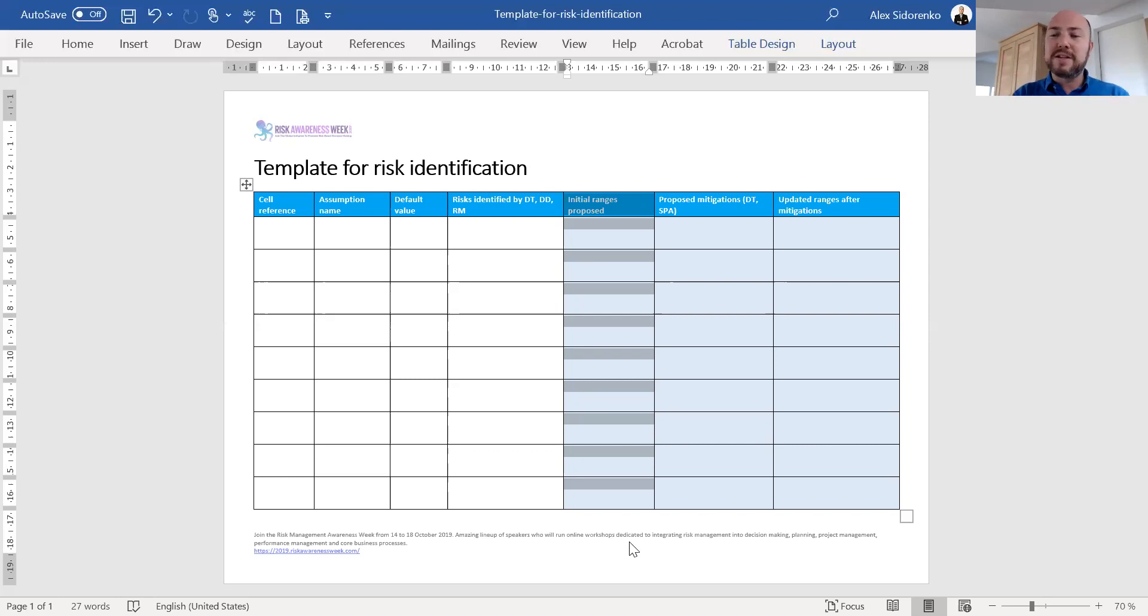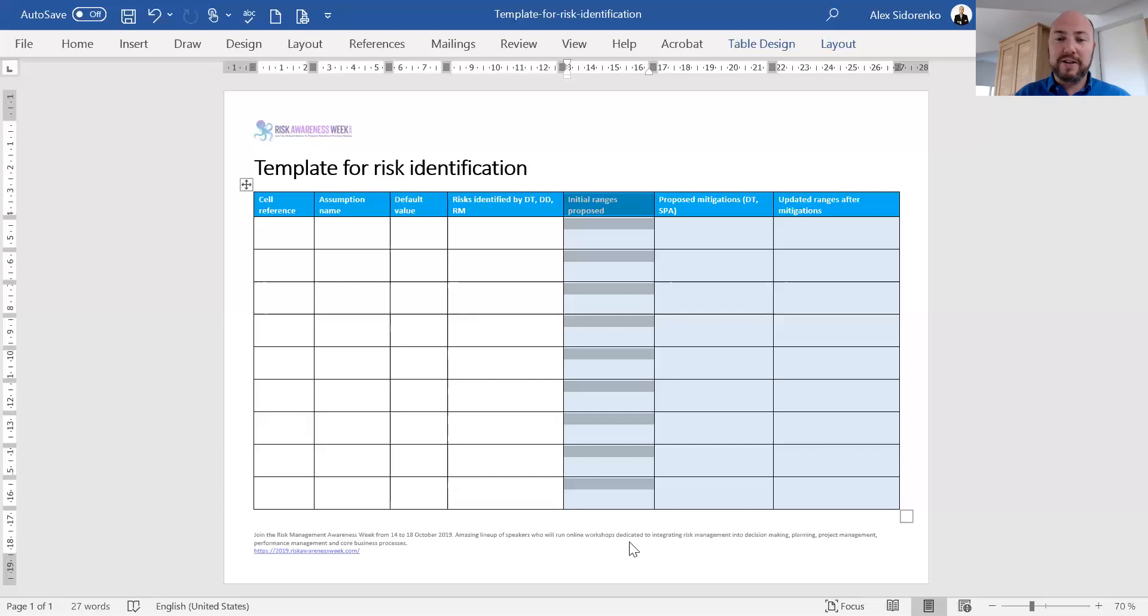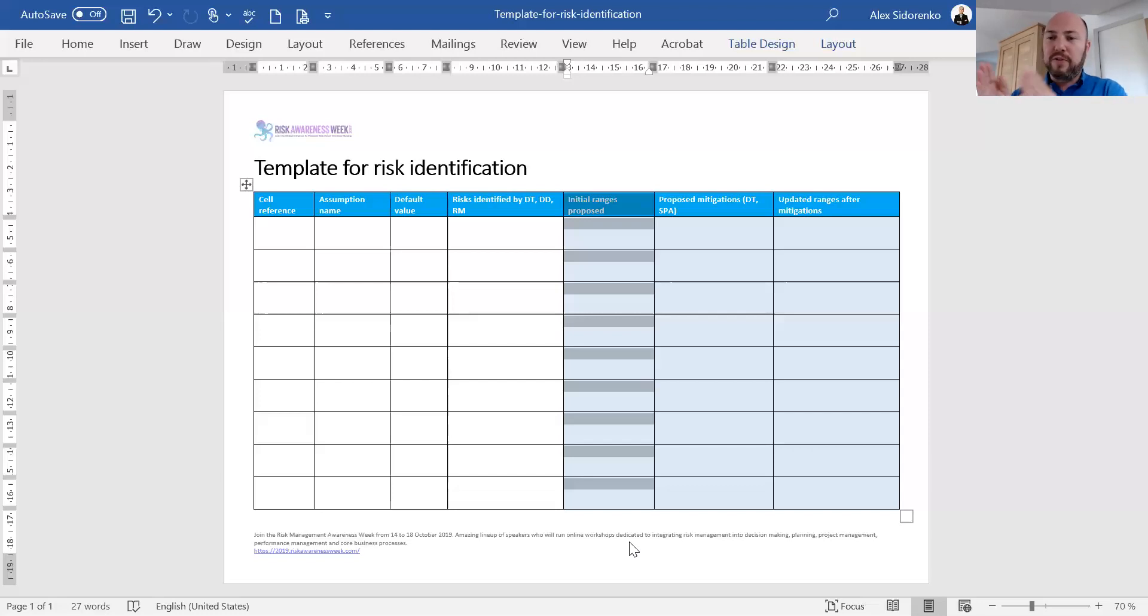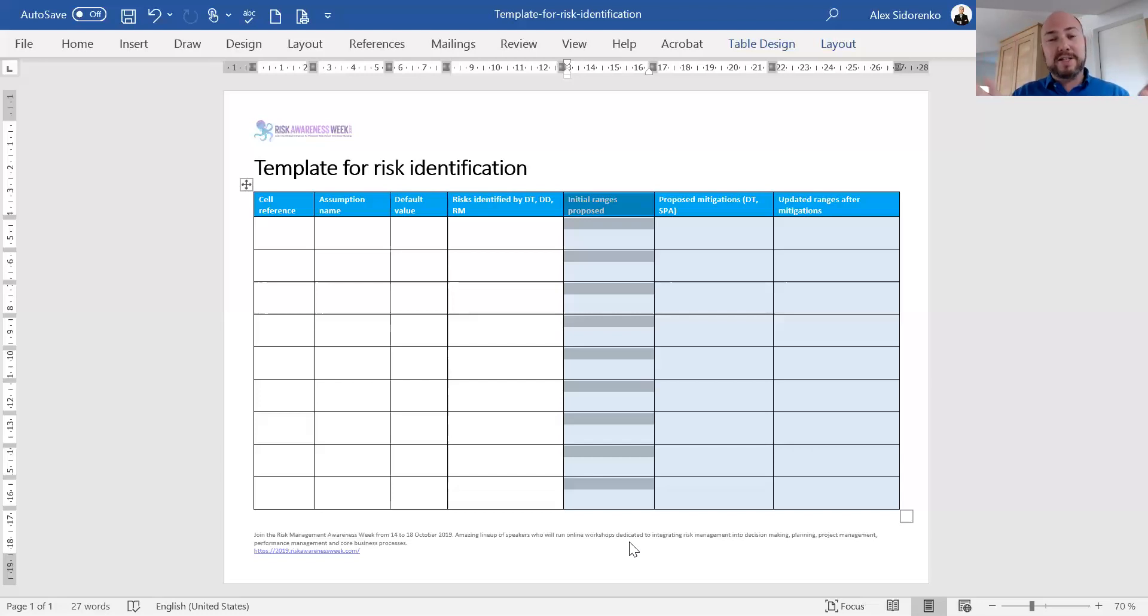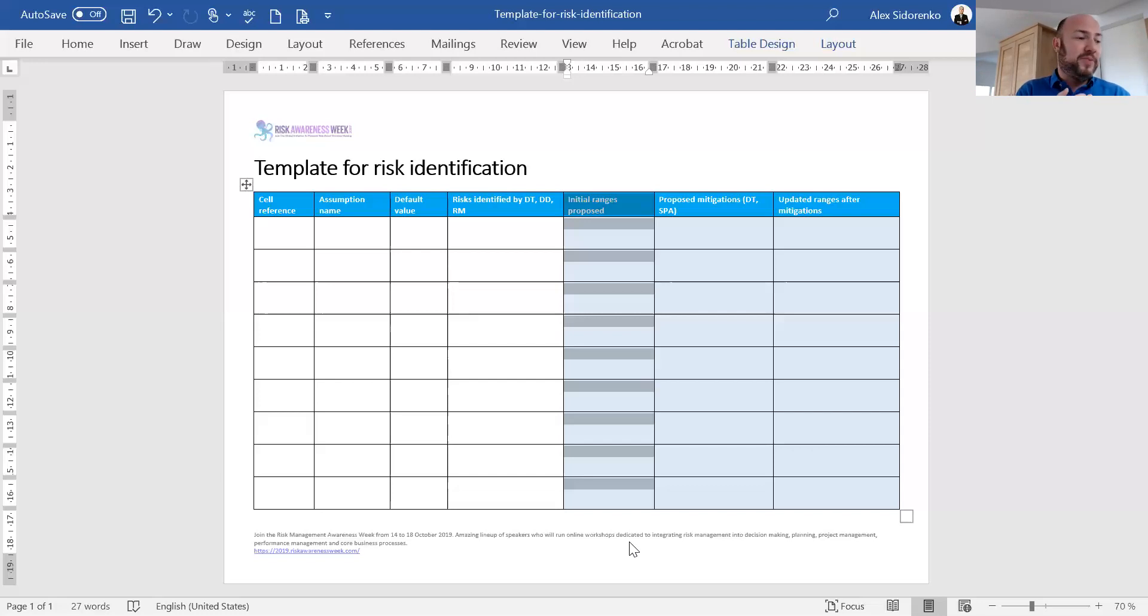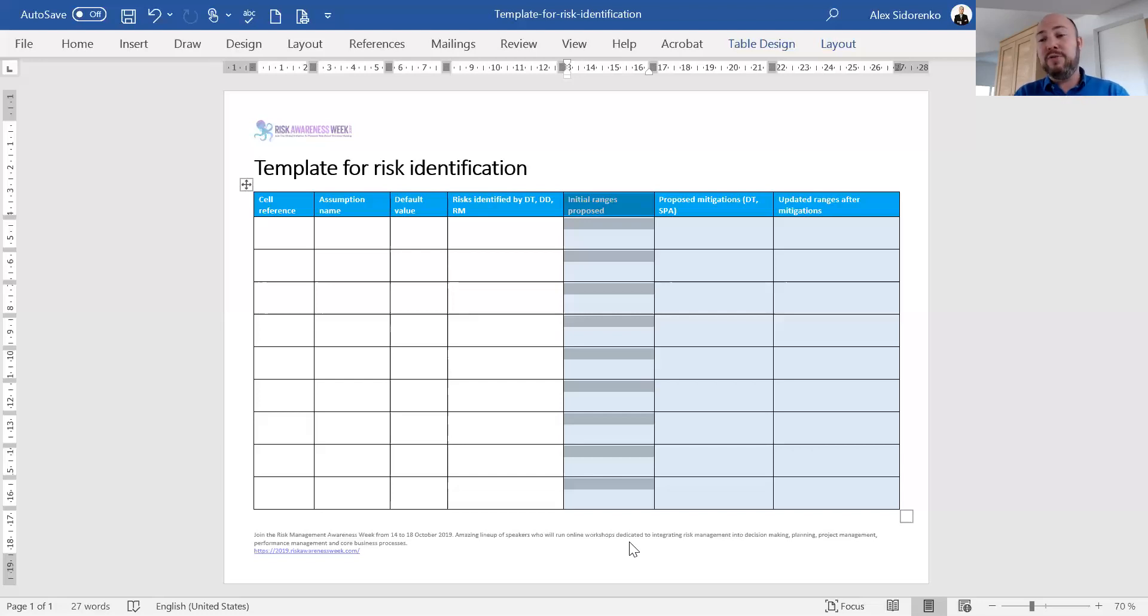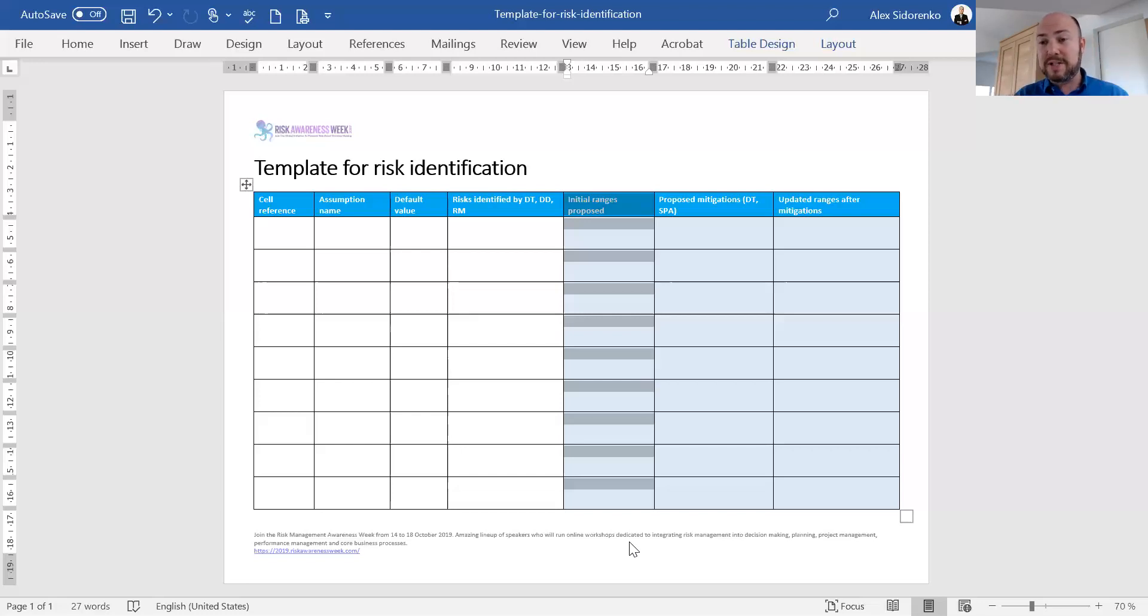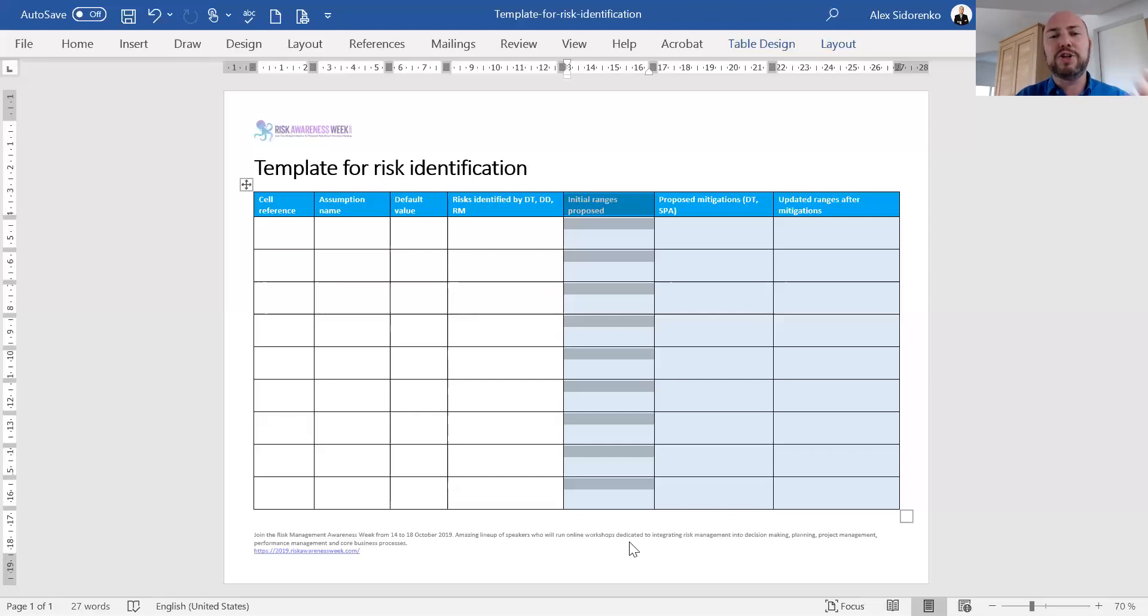This is the time when we run the initial simulation using Monte Carlo or whatever other technique you prefer. We run the simulation. Because we have all our inputs as ranges, we now have all our outputs—our decision criteria—as ranges as well. We have them as a probability distribution. Now we can tell whether the decision is a good one, what's the likelihood of achieving or exceeding that decision. Based on the tornado diagram, we can tell what are some of the assumptions, hence risks, that have the biggest influence and hence need to be mitigated. It's already giving us a lot of ammunition to improve the decision making.